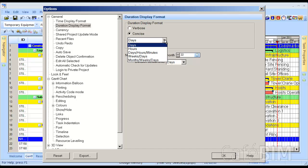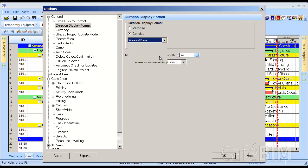If we had something that was five hours, we can just click on hours, and it would show hours. Or, if it was five hours, we can click on days, and this would show us probably half a day. I like to use weeks and days, and basically, if something is five days, it will say one week. If it's four days, it will say four days. This is something that you definitely want to adjust according to your needs and preferences.